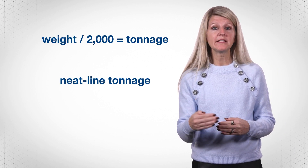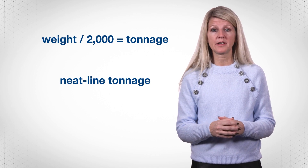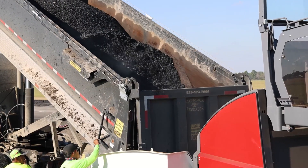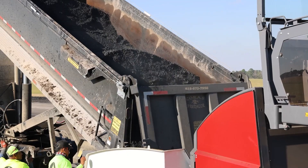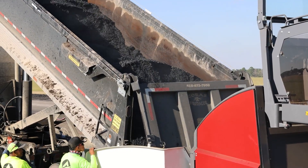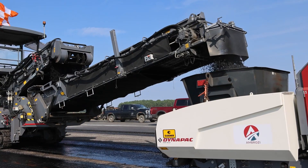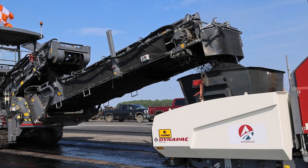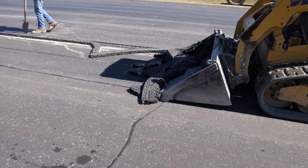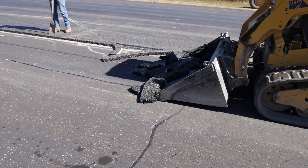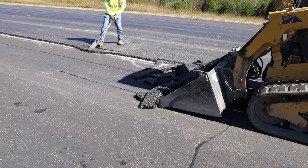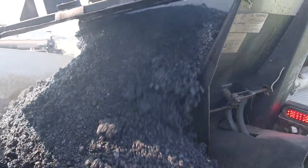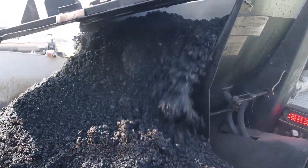This is called the neat line tonnage and does not allow for any waste. Constructing a project typically requires more than the neat line tonnage. Some material is used to heat up the material transfer device and paver, then discarded, and edges are trimmed to construct longitudinal joints. Small fluctuations in the underlying material may also affect how much material is needed.